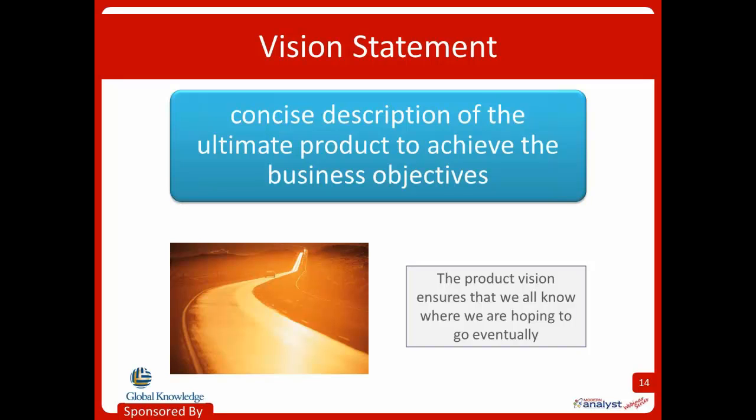You might encourage your key stakeholders to actually draft their own vision statements for a project. This is going to help you very quickly illustrate different understandings about their objectives. And if you're well into your project, it's still not too late. You can actually go back and do it. Pull everybody together in a half-hour meeting and say, here's what a vision statement is. Let's all draft them together. Okay? Doing this, you can fix any sort of lack of focus or lack of direction that you identify in your stakeholders sooner than later. So kind of a neat activity that you can do midway just to get everybody refocused on what's that goal, what are we trying to do.